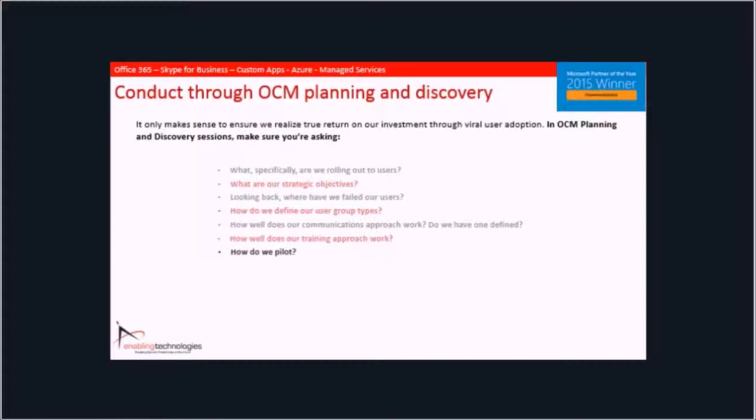Also ask yourselves how you pilot. All right? A true pilot, as mentioned earlier, is not just IT department user acceptance testing. It should be a representative cross-sampling of the organization so that we can actually expose these people to our planned communications, to our planned training approach. Then let them have the solution after they've been through all of those things for a couple of weeks, and then we survey them heavily so that we can get their feedback on our direction. Right? Why not use our pilot group to course correct if we need to with regard to change management before we roll this out to all of the users?